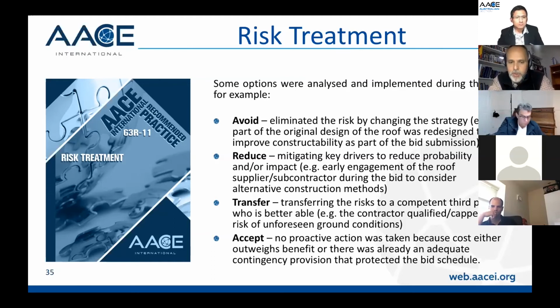Sometimes you have an insurance, you can say there is an insured event, I can transfer this to an insurance. That's not my preference, because even though this is a safety net, if every project team thinks that they can tap into an insurance, then the insurance for your organization is going to be way over the roof. So I think what you need to do is look at ways to qualify some of the risk, if it's possible,